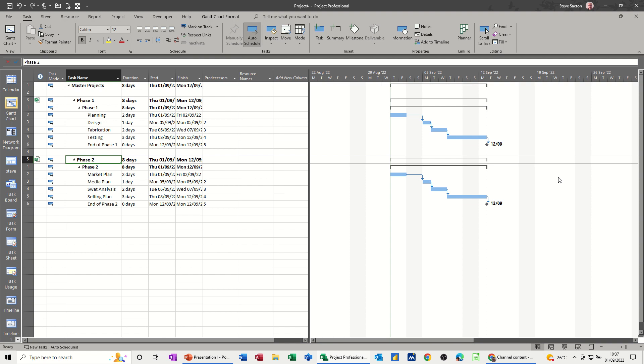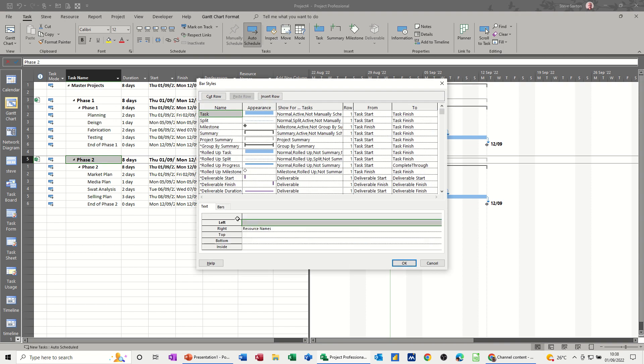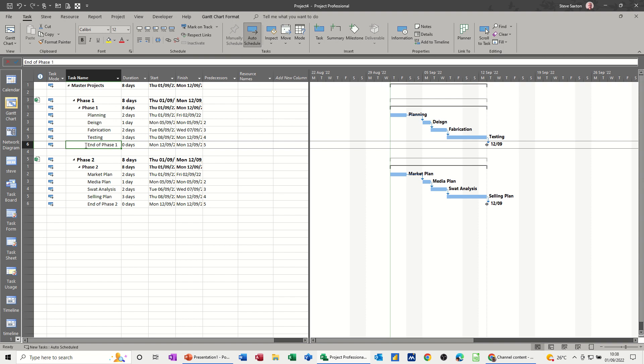Now to make the link between the two of them, let's just double-click on this white area and get some information on the Gantt chart. We can see that stuff there. Let's say when End of Phase One finishes, this Marketing Plan can start.